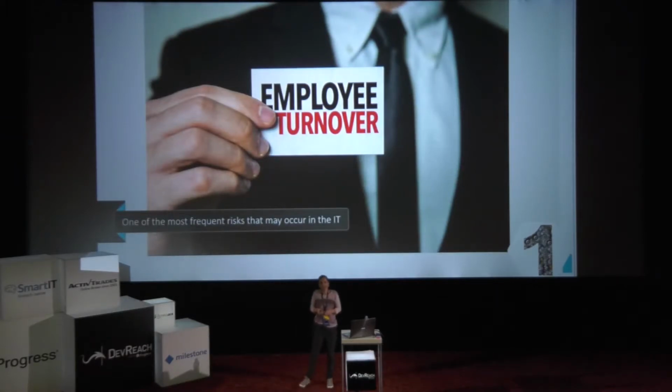So let's see if all of you know what turnover means, employee turnover. Okay, exactly. From the perspective of risk, if we are looking from the perspective of a team, it means that some of our best engineers can leave the project or the company out of the blue. If this happens, they inevitably take some critical information and knowledge base with them. Even if this is temporary or permanent, it will cause some errors and delays on the project, and the team that is left needs to figure out how to handle the situation that just happened.